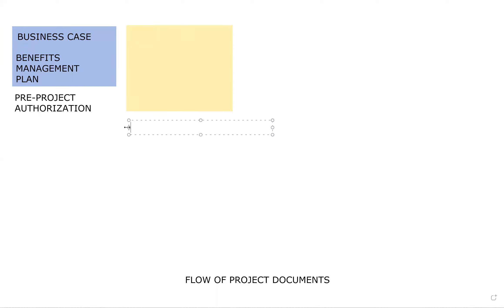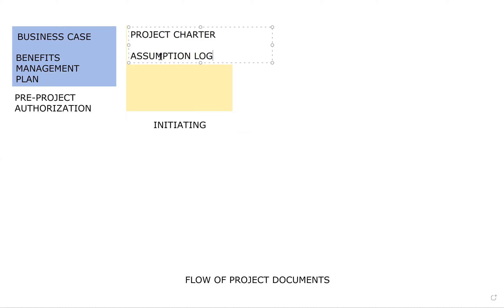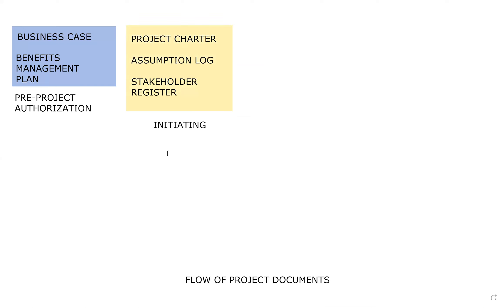Once the authorization has taken place, there are things that you get from initiating the project. From initiating, you get a project charter and also an assumption log — a log of assumptions and constraints. The other thing you get from initiating is the stakeholder register, which catalogs your stakeholders, the major things they are seeking, their level of power, influence, interest, and things like that.